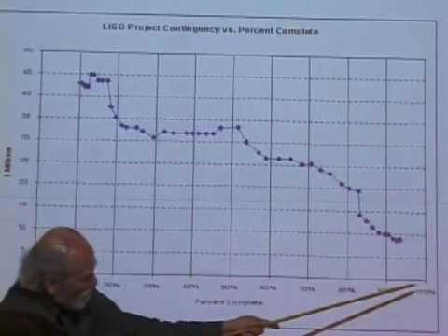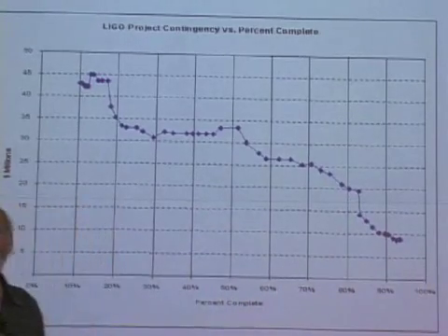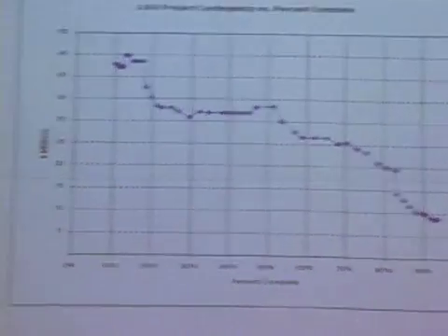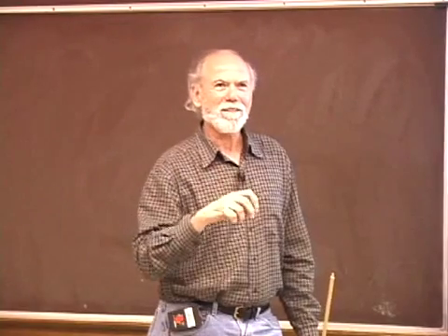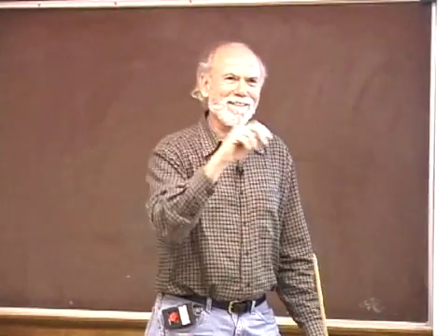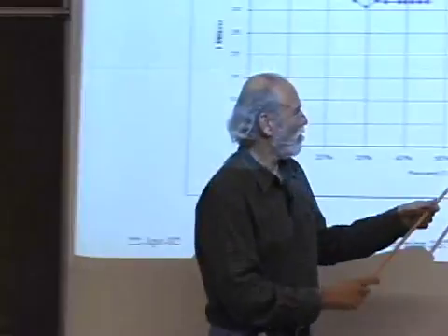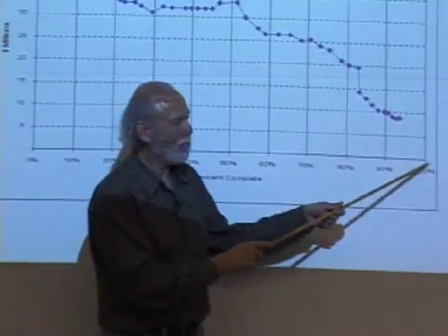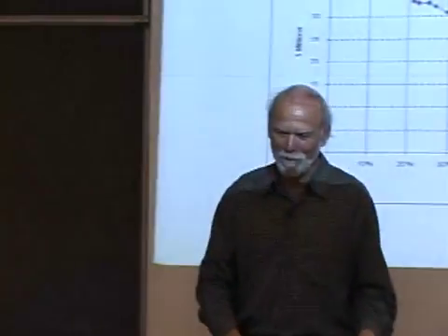We're still doing this very last piece. The very last piece is easy for us because what we deferred to the very end is $3 million worth of computers. Of course, the later you buy those, the better computing you get. If you buy 2.9 million instead of 3, it doesn't much matter. So it's easy for us to bring this right down to the last dollar, and we won't have to give a penny back.